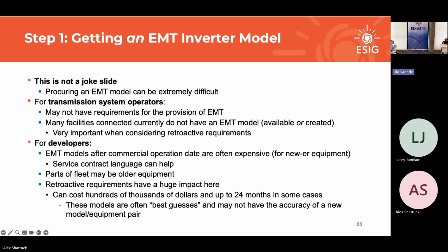Part of your fleets as developers may be older equipment. You might have mixed sites with brand new inverters with EMT and other ones with old inverters that may not. So weird nuance there for study space. Retroactive requirements can have a huge impact on the developers. So if I ask for EMT model for everything, then we're talking maybe 2 years, hundreds of thousands of dollars. And even when you go, and I've done these before, even when you go and ask for a piece of old equipment's EMT model, even if you're spending a bunch of money and you're waiting 2 years, someone's guessing probably on the back end, right?